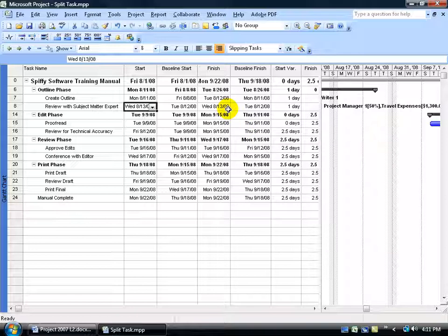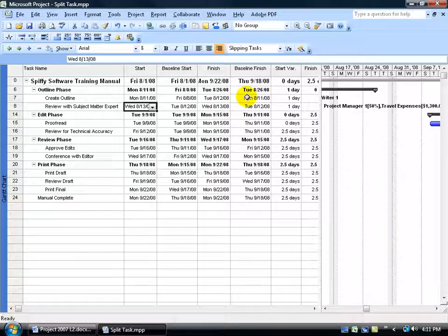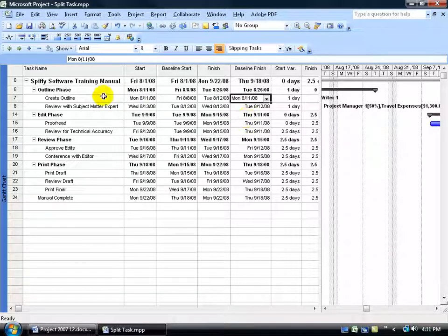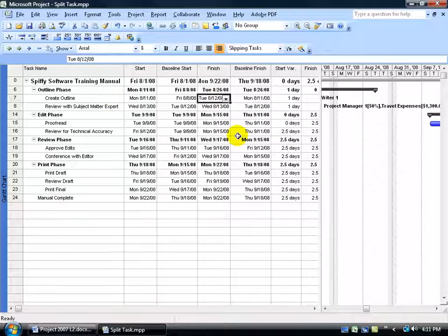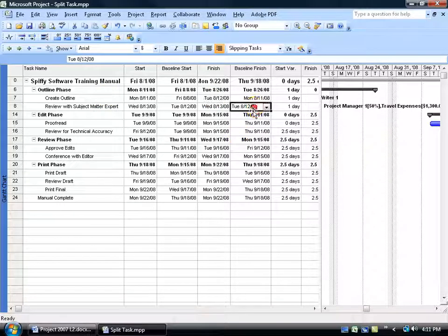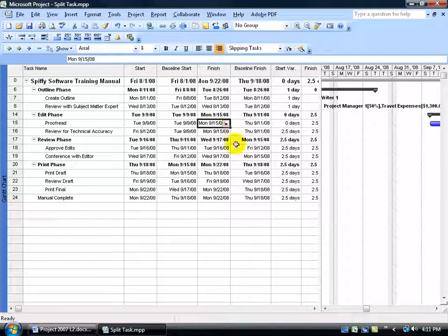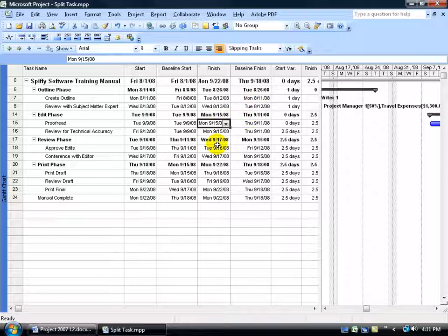And then I can go ahead and at least compare my baseline finish, which was August 11th for creating an outline, and the actual finish. It was delayed by one day. The baseline, the 12th, the 13th. The baseline, the 11th. Wow, we really delayed it here on the proofreading. But it's kind of like a snowball effect. When you delay one, it bumps out the other, and it continues on down.